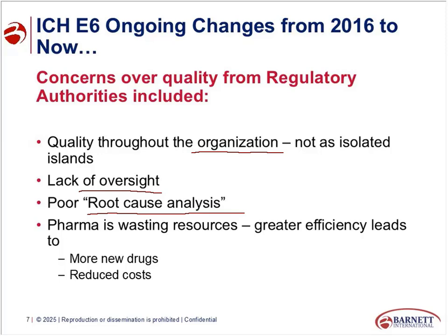So one thing I'm going to talk about as we go through these materials is very proactive, preemptive risk analysis. It's almost doing the root cause analysis on the what ifs. What if this happens? What would we do? What if this happens? What would we do? And the what if being if it's caused by a certain event. So it could be that there is an issue with the transportation of investigational product because of border control, or because our ingredients list isn't accurate, or because our manufacturing packaging isn't correct. That's going to be very, very different than a normal deviation in terms of the pharmacist wasn't available.